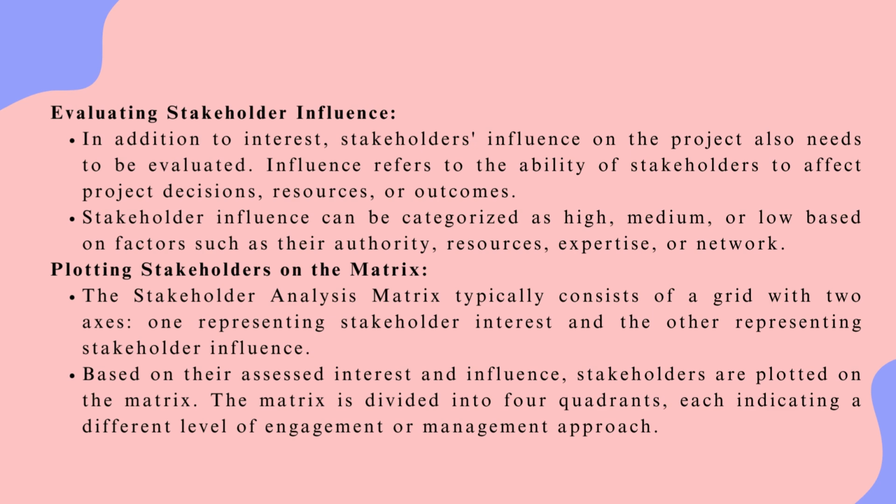Third is evaluating stakeholder influence. In addition to interest, stakeholders' influence on the project also needs to be evaluated. Influence refers to the ability of stakeholders to affect project decisions, resources, or outcomes. Stakeholder influence can be categorized as high, medium, or low based on factors such as their authority, resources, expertise, or network.